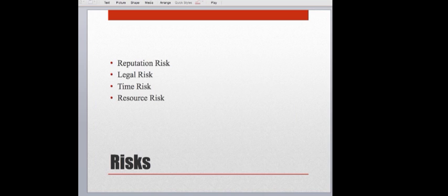In order to make up for that, they're going to take some of the UAT time. We were going to have a 3-day user acceptance testing. Now we're going to have a 1-day user acceptance testing. If you keep sucking up the UAT time in other processes, you've got the risk that you're not going to have any time for UAT.